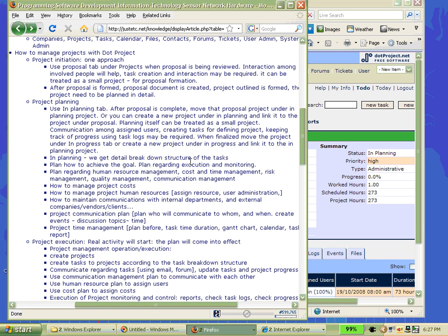And also in the first tutorial of this project management series, we talked about the CPM model. So you can use that CPM model to define the project time management. You can define all the tasks and the sequence of the tasks and the dependencies of the tasks, and the time required for each task, and you schedule them in a way. And you also have to find out the shortest possible duration of the project. I think you need to understand the CPM model a bit more to define the timing for the project. So that will go under the project time management.